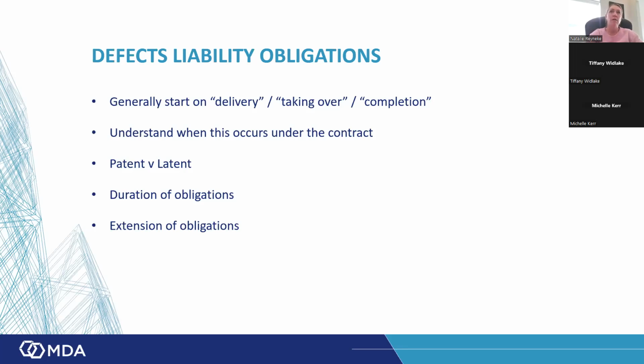I've had guys as well, they've come and said, no, 5 years after they've handed over the work, there was this latent defect, a claim for a latent defect. And I'd simply say to them, request the maintenance schedules for that particular piece of equipment. And obviously the employer couldn't provide those maintenance schedules. So we had a nice defense to the latent defect claim to say that it's not a latent defect, it was not maintained correctly in accordance with the operation and maintenance manuals.